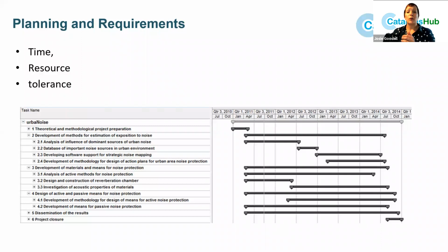We normally do this by breaking down the tasks in some way and then estimating how much time is required. And we normally put a tolerance on that. If we are overly optimistic, and people generally are, in what can be done in the time, you may find you don't have enough time to complete your project. So it's normally said that you need to give a 20% leeway for people being optimistic about what they can do on a project. So when you're estimating the time, you need to give yourself a tolerance to allow for sickness, people going on holiday, people having to be taken off to do other tasks, all sorts of things, just to give you leeway in case something goes wrong or something goes right.